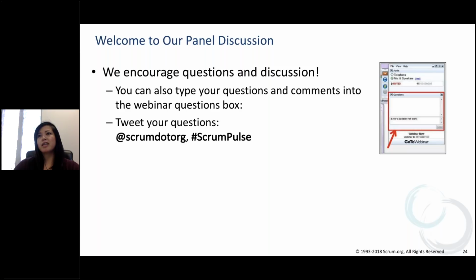That's why we actually say don't even consider something like Nexus until you're hitting 3 teams. Because if you have 2 teams, they should be able to talk together. But if you think about the complexity that happens when you're talking about 3 to 9 teams working together, I believe there are going to be some different events that you're going to want to toggle just to make sure that you're lifting up the transparency. But if it's working for you and you're able to manage that and measure that, then go for it.